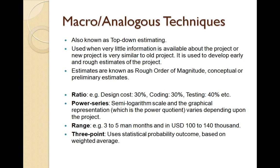The power series technique uses a semi-logarithmic scale and graphical representation, with a power quotient that varies by project. Project-specific data is plotted and extrapolated to derive estimates. We also use range-based estimates — instead of a specific number, we provide a range, such as 3 to 5 man-months and a cost of $100,000 to $140,000. Three-point estimation uses statistical probability based on a weighted average, considering probability and weights attached to estimates to reduce estimation errors and produce more predictable estimates.